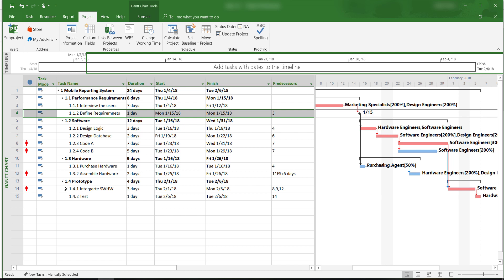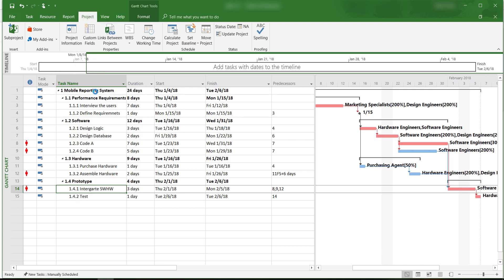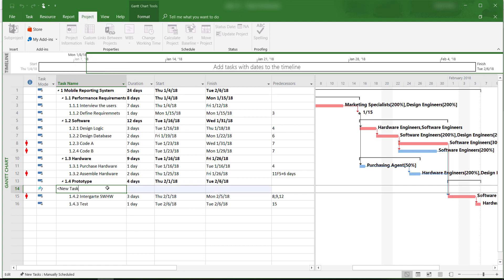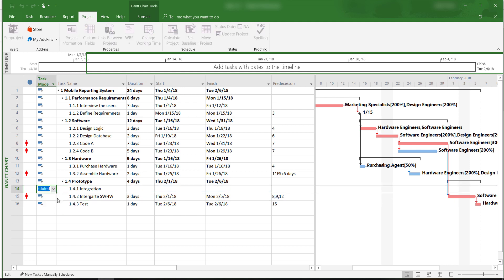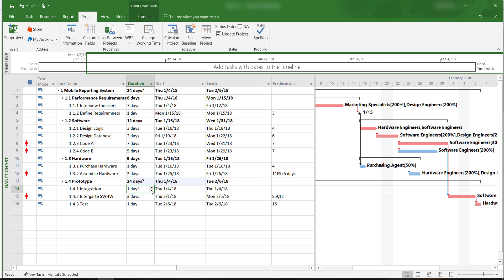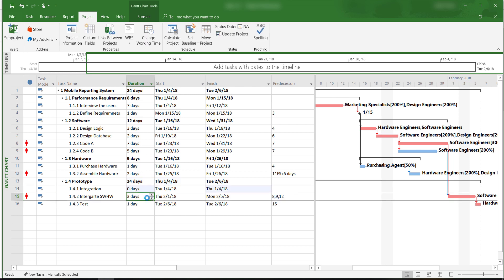We need to type in the information similar to the way we would insert a task. We right-click on the activity, insert a task, give the milestone a name, and then set it to Auto Schedule. Since milestones do not consume time, we enter zero for the duration. We change the start date to the beginning of integration of software and hardware, which is February 1, 2018.